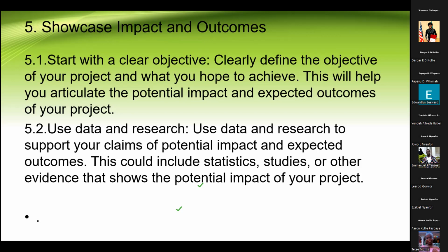Now, if this is a project and no studies have ever been conducted in this particular region or county or area where you want to implement, you must indicate as such. What we look at as entities that fund other entities is, did you put in provision for research within this project? Is there a baseline study? Because if there's nothing, we need baseline information. And if you have given us information, what do you base it on if there's no baseline?